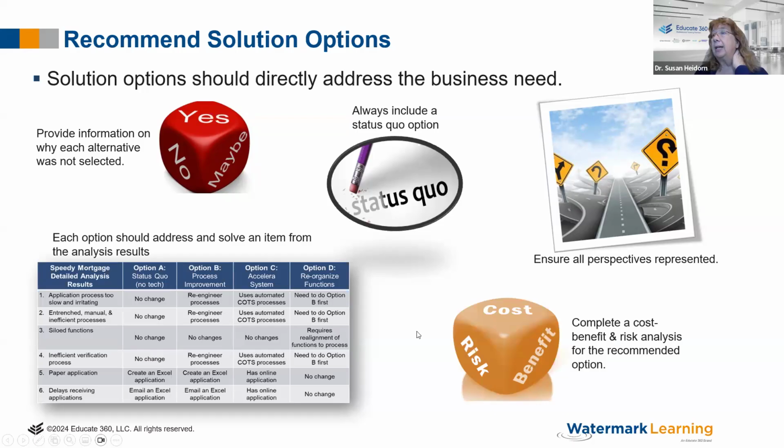And then for the recommended one, you might go further into the cost: implementation cost, purchasing cost, and the one that's always forgotten, support cost. It's not just the cost of implementing it. Oftentimes we forget support cost, which can be huge and can make a difference on which one you're going to recommend. Because if one software takes just a little bit of support and maybe internal people can do that, and our next one is huge and you have to mostly have a vendor support it, that might make a really big difference on which one you recommend.